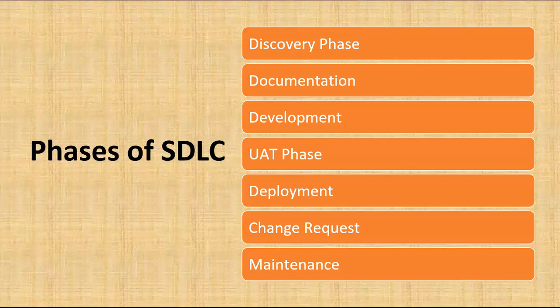In the deployment stage, usually we deploy our robots in the production environment. The deployment stage, or the hyper deployment stage, we also call hypercare. Before going to the deployment, we do a stage called hypercare. In the hypercare, usually we run our robot as per standard 5 times, so 5 runs.